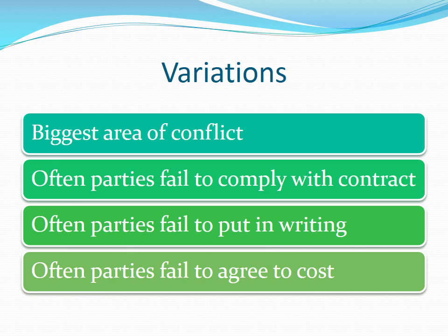In the security of payment process, if there is no agreed cost or method for calculating the cost of work done, the adjudicator is required to follow a process as set out in the security of payment legislation. Often this process is not helpful and significant differences in the figure determined can occur depending on who is doing the calculating. It is recommended that you read the applicable Security of Payment Act for your business.